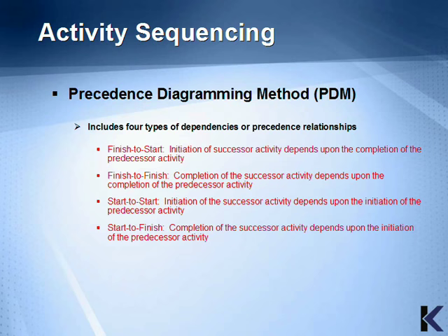The first one is finish to start, which means the initiation of successor activity depends upon the completion of the predecessor activity. Finish to finish, which means the completion of the successor activity depends on the completion of the predecessor activity. Start to start, which means the initiation of the successor activity depends on the initiation of the predecessor activity. And start to finish, completion of the successor activity depends upon the initiation of the predecessor activity.